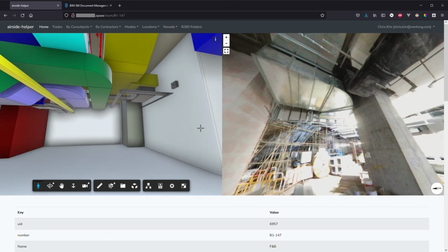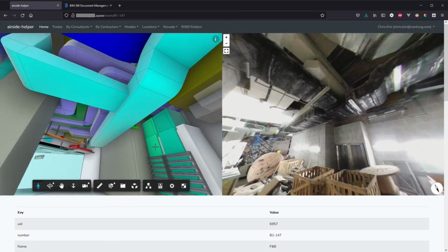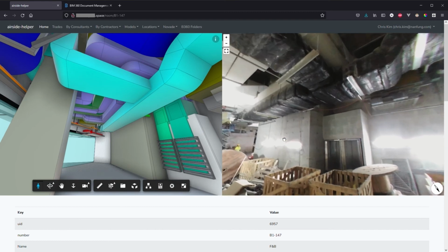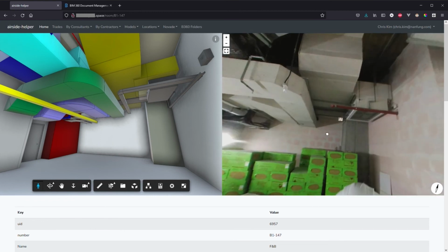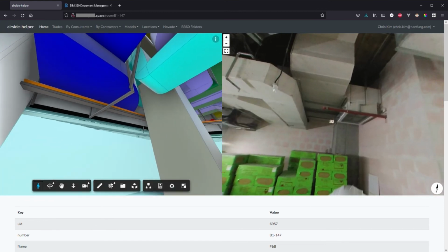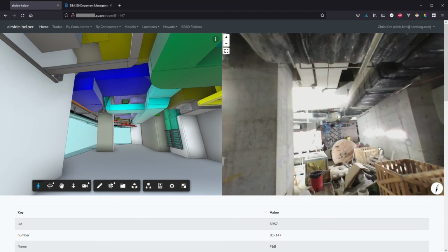There are currently 3D view and CSV plan view published from the live Revit files for each room, and we can compare against the photos we capture on site to verify live models that are updated by contractors towards as built and improve the accuracy of models.